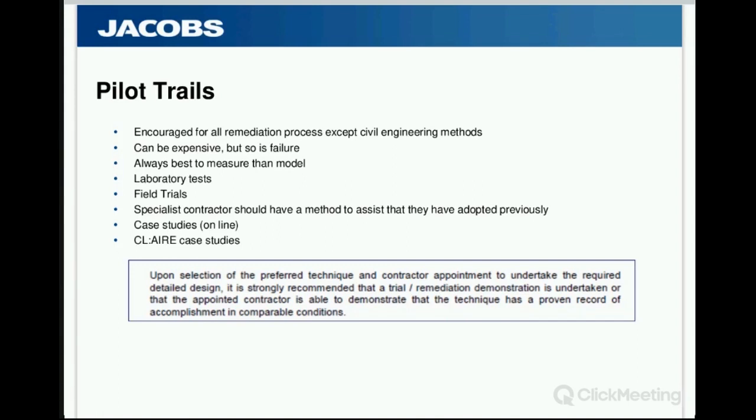So, for example, I've been involved in a reed bed scheme where we collected the impacted water and took a few IBCs of it away to a nursery for a reed bed trial off-site. Installation of a permeable reactive barrier where a small-scale injection was introduced to the scheme. A thermal process where material was sent overseas to a fixed plant to see if it would be operational. Material recovery where we mobilised a soil washing plant to site to do a test run. Solidification, where we've taken a sample of the material and tested it at a bench level and tank tested it. Bioremediation, where we've done an on-site trial on material. Three-phase product recovery, again, with on-site test boreholes. And groundwater pump and treat, where we've collected water and tested it in a lab trial.